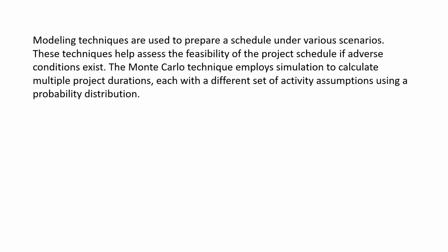Modeling techniques are used to prepare a schedule under various scenarios. These techniques help assess the feasibility of the project schedule if adverse conditions exist. The Monte Carlo technique employs simulation to calculate multiple project durations, each with a different set of activity assumptions using a probability distribution.